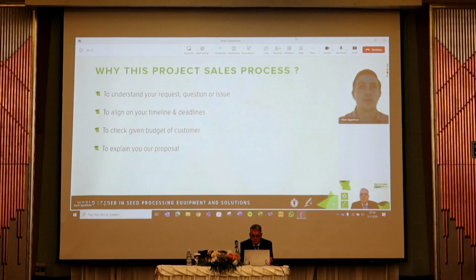A lot of times our customers are fixed on a certain season, and they want to be operational before their season. And for us that's good to know that we can make a project planning to see, okay, if we start now, can we prepare and build everything on time before the season starts?